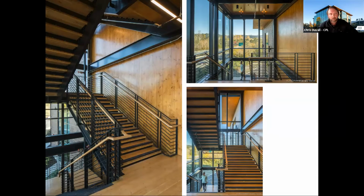So if you're comparing prefabricated mass timber to, say, concrete construction where it's all cast in place on site, you can see a schedule savings because the prefabricated pieces are going to go together quicker. If you're comparing it to structural steel that's also prefabricated, like what we had on this site, maybe it's a wash. But every project's a little bit different, and so you just have to work with your general contractor and your installers to figure out if you're going to get a schedule savings. But certainly there can be a schedule savings with mass timber.